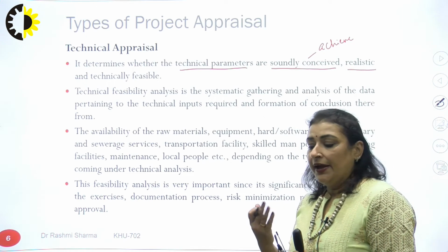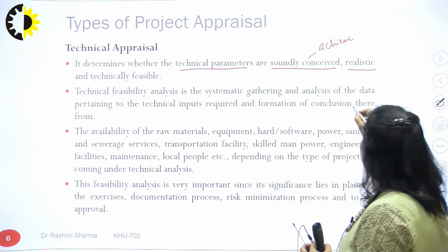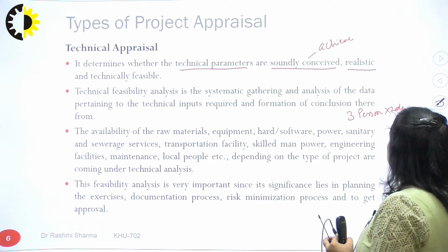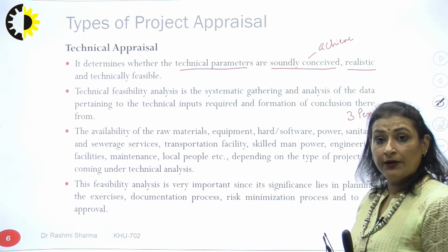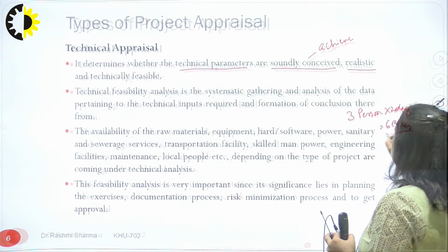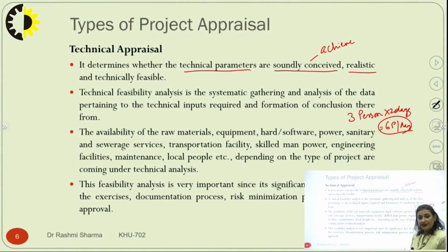So in realistic terms, if I give you one example, if I have 3 persons who can work for 2 days, so 3 persons working for 2 days is 6 person-days. That comes out to be when I require 6 persons, and we can have that work done. So this is one way. Another way is I take 6 people and work for 1 day, but the output of P1 is dependent on P1's second day task, the day 1 and day 2 task. So if dependency is there, then this is not a feasible solution.